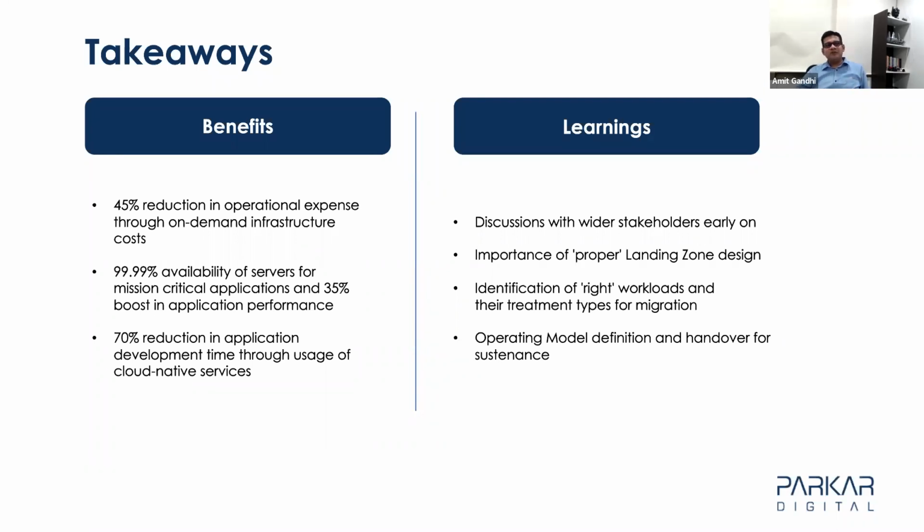A few learnings, and I cannot emphasize enough about this. We have observed this in multiple engagements, about this being maybe a CTO initiative and not enough internal teams brought on board to execute a massive project like this. The first thing we did was talk to the customer and bring many other important stakeholders on the table, such as the operations team, IT, business teams, and others, to talk about the cloud business case and what the future would look like.